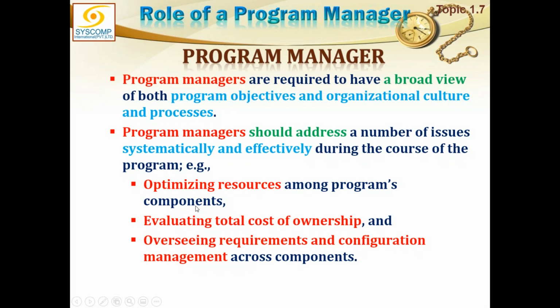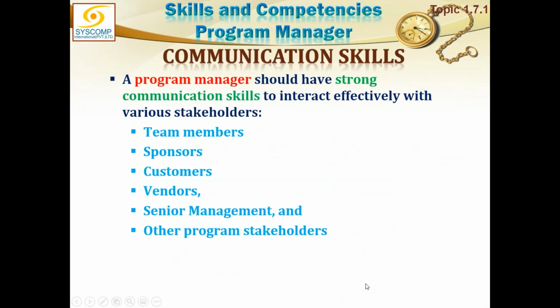Now, you remember optimization of resources was the portfolio responsibility. But having said that, the program manager is responsible for all the program components, which include the projects and distribution of resources among these components. So the optimization of resources within the program components is the responsibility of the program manager. Evaluating total cost of ownership and overseeing requirements and configuration management across components. These are the program manager's responsibilities.